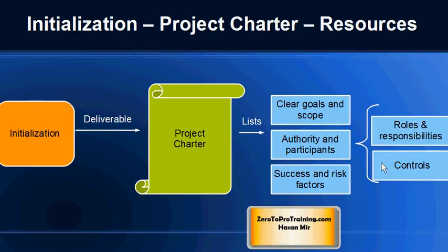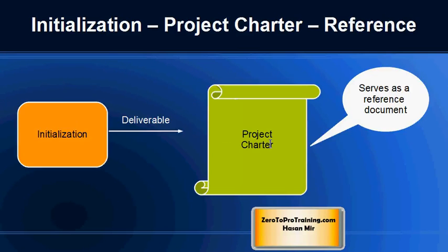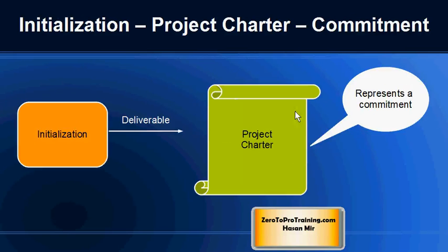Also in the project charter it is mentioned who are the key players and which person is playing what role and what is the responsibility that comes with that role, and how the controls will be implemented, how the communication will take place, and what would be the protocol. As mentioned earlier, this document is referred to throughout the project, and this becomes the main reference document. And also this document represents commitments from everybody in terms of time and resources.